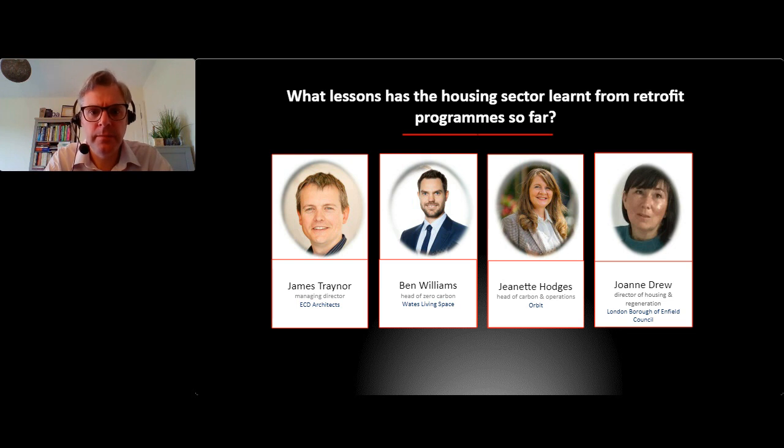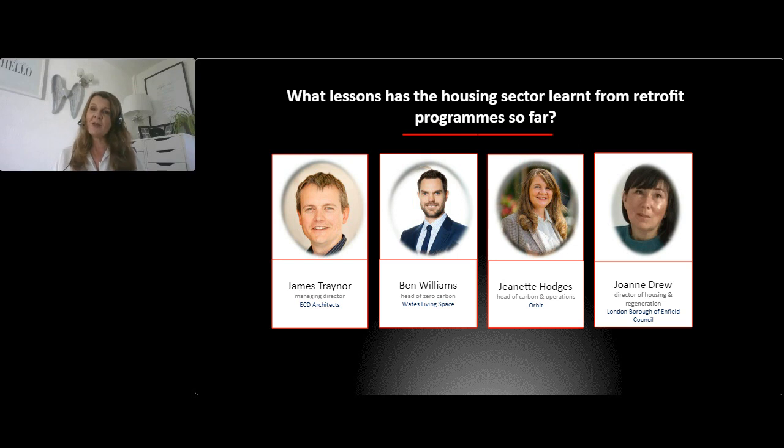Thank you. So I think in terms of measures of success, there's no silver bullet here. We're looking at a range of measures when we have a formal period of monitoring. As Ben said, there's lots of things that we need to do as part of the government funding, but we do air tightness testing. We are using smart thermostats so we can monitor humidity levels, heat levels, how quickly a property heats up, how quickly it cools down, remotely as well. That will give us alerts for the residents in terms of potential mould or fuel poverty issues. We're also looking at thermal imagery both before and after, as well as the energy demand performance, the kilowatt hours and the EPC rating. So a whole suite of measures I think are really important to get the balance as to what's success. Customer satisfaction, absolutely.